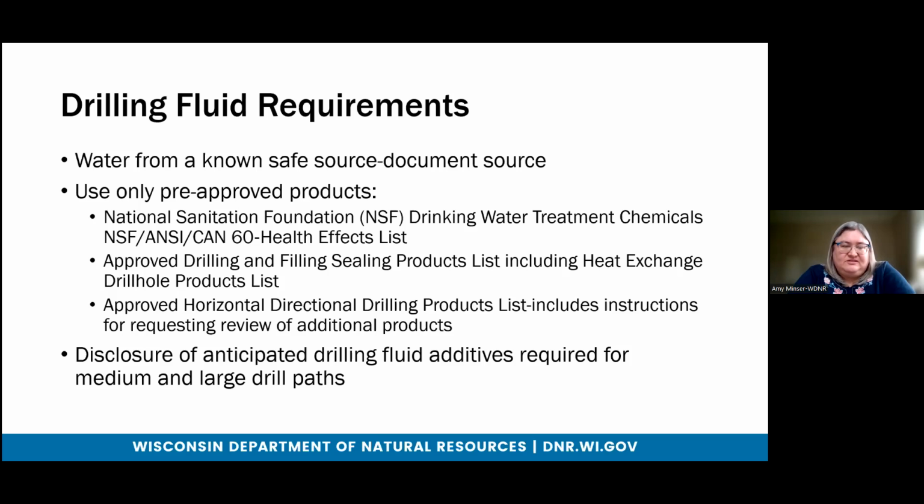We've been working with our drinking and groundwater program to have some requirements for drilling fluid. So to start with, water from a known safe source, similar to drilling other wells, and to document that source in case an issue comes up, we would possibly ask for that information. So it's good to have it documented.